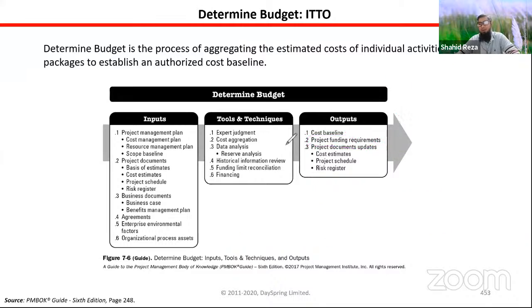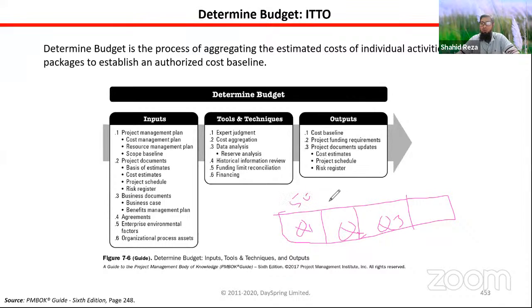Donor funded or private sector, everywhere. So you have to show that in quarter one, quarter two, quarter three, for example, this project will need 3 quarters or 9 months. So when do you need how much money? In quarter one, say you need 500K. In quarter two, maybe you need 100K. And the rest, 25K, you will need in quarter three.